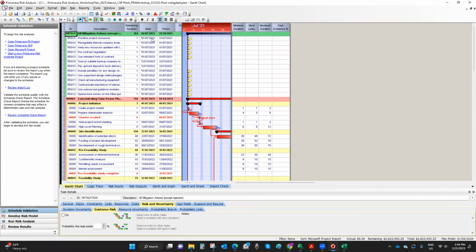Now, the past dates were in my spreadsheet. I didn't change them. I just imported it without thinking. So in your course, project risk management, always make sure that all estimates and start and finish dates will be in the future, because you'll be working on a new project. So if you're using those templates provided to you in your risk management course, remember, you can always change the plan information. They just provide it to you as an example, but you certainly can change it.